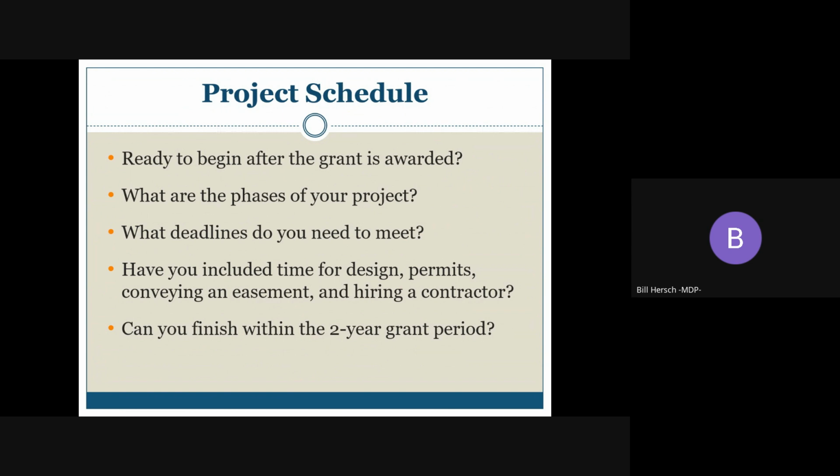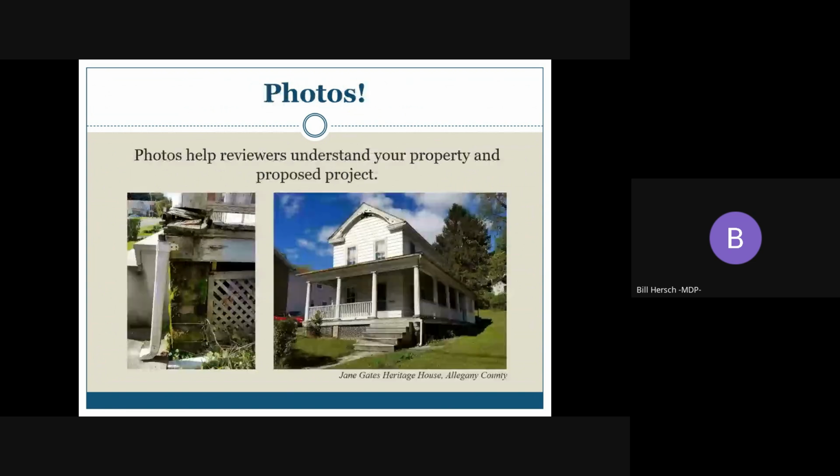These all take time, so consider them in your project schedule. We expect that the project will wrap up in a 2-year period. Please know that your project won't start right away. It'll take some time to complete the grant agreements or easement conveyance processes.